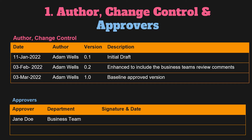Section 1: Author, Change Control, and Approvers. Any project's functional requirements document is crucial, so any changes should always be managed by the document's owner. The first section should outline the name of the author and change control — listing dates, authors, and details of any changes made to the document. You can use this data to track modifications during the life of the requirements document. The approvers are the people who will approve and sign the document, typically the customer team. In our case study, Adam Wells is the business analyst creating the FRD using the signed-off BRD, and Jane is the approver post-review.